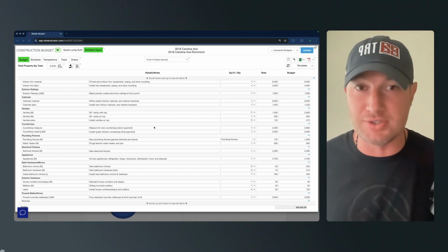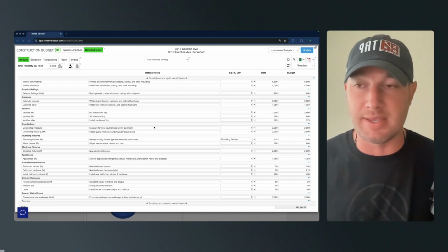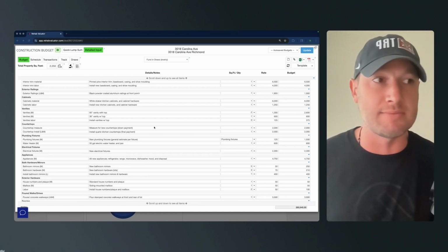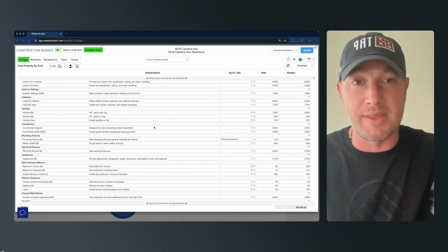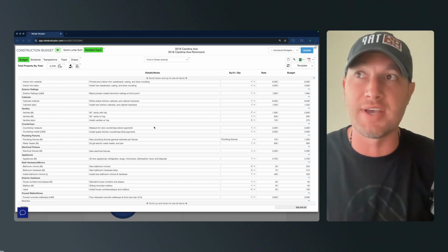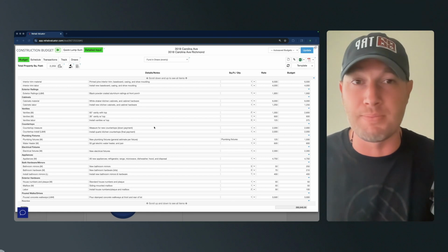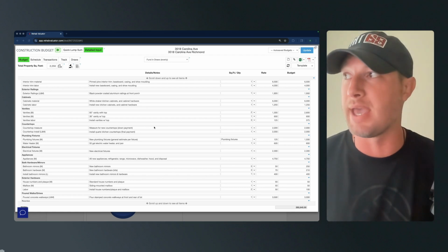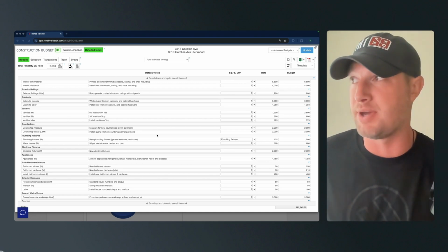Remember, again, strategy with estimating. Your job is to make sure you have everything listed. And what's going to happen is some items you're going to be under budget by 500, some items you're going to be over budget by 500, but the idea is by the end of the project, it all comes out in the wash and you end up where you're supposed to be. So don't beat yourself up if you are $500 over budget. Just know that you shouldn't be under budgeting everything, obviously. You should always be honest with yourself, and it should always be coming out in the wash, or else you're kind of lying to yourself, which is a big problem when it comes to making budgets.